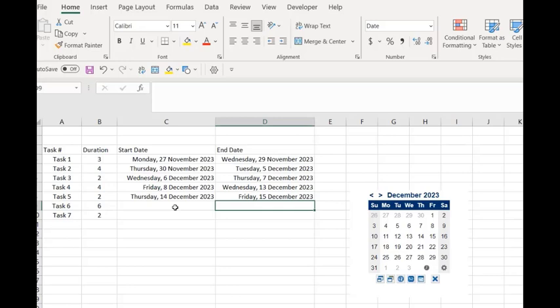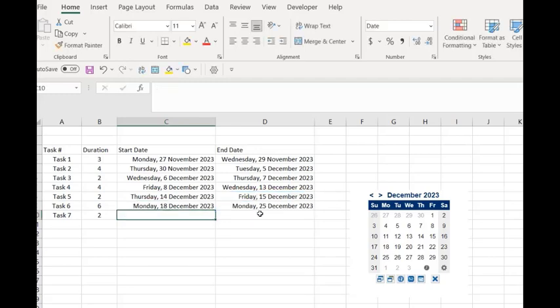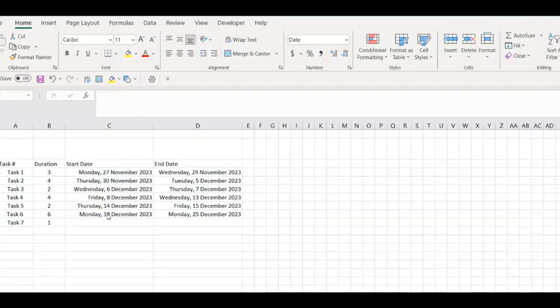If you put Friday +2, you're going to get Sunday, because of the problem that I told you. Excel starts counting from the following day. So I'm going to have to put equal to Friday +3, and I will get back the Monday. And it is going from the 18th to the 25th. Alright, I had to adjust the days here so that we could get away from having to have Christmas as a holiday. Alright, now we are fixing up the calendar.